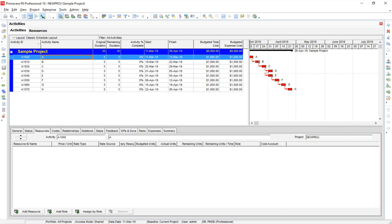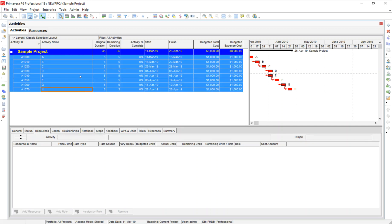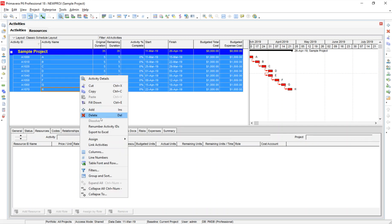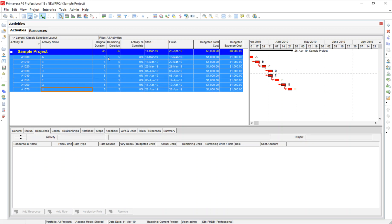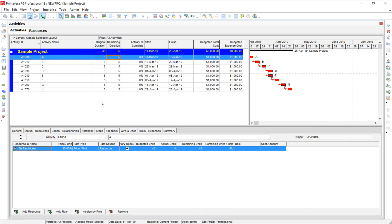So there are no resources assigned. I've gone in and I've created a resource in my resource dictionary, but I haven't assigned it. So I'm going to go ahead, highlight all these activities, do an assign resources, and go ahead and put an electrician on each one of these activities.